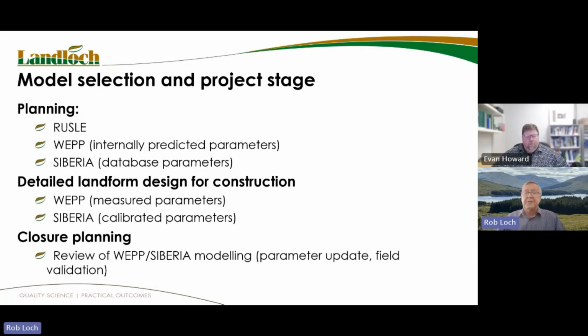When you move to the point that a mine is actually seriously starting to move thousands or more of tons or cubic meters of material and starting to construct a landform, that's at the point where you would like to see greater accuracy. For example, and Evan can talk to this one better than I can, it's a point at which if you know what the contours of your final landform are going to be, and you build to it, you can save an enormous amount of earthworks. Evan did touch on that earlier. And similarly, you might use Siberia with calibrated parameters, but in the first instance, you would certainly run WEP.